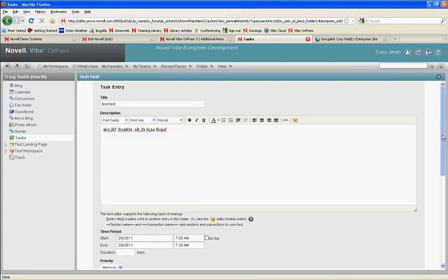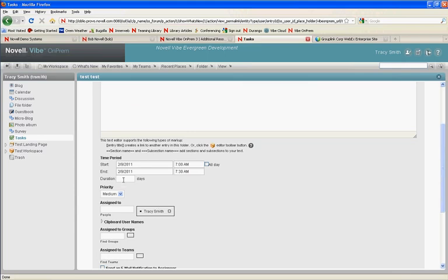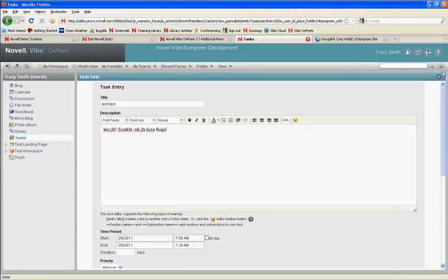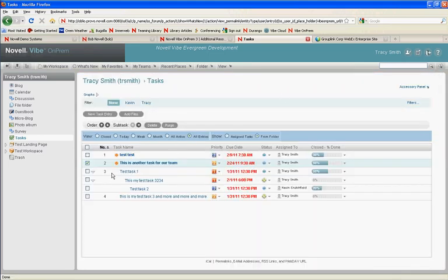Before, it was typically just start and end date, and those were required, but now you can simply attach a duration to a task, and based on your task ordering in the list, that duration will automatically calculate out the due date based on its previous dependencies. So the short answer is no, but we've done a number of new things that I think will add some added value there.